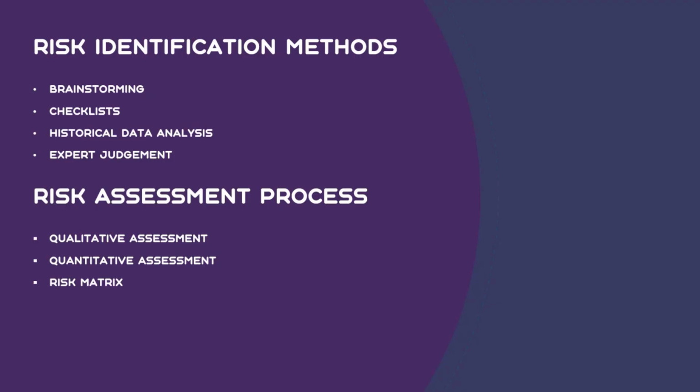Really critical risk. If I'm not addressing this, it's going to drain my money. This way we do quantitative assessment. For the budget overrun issue, likelihood of occurrence I put 10 out of 10, and the severity I put 10 out of 10, because it's a very critical issue. So 100 is my score and it's very severe.